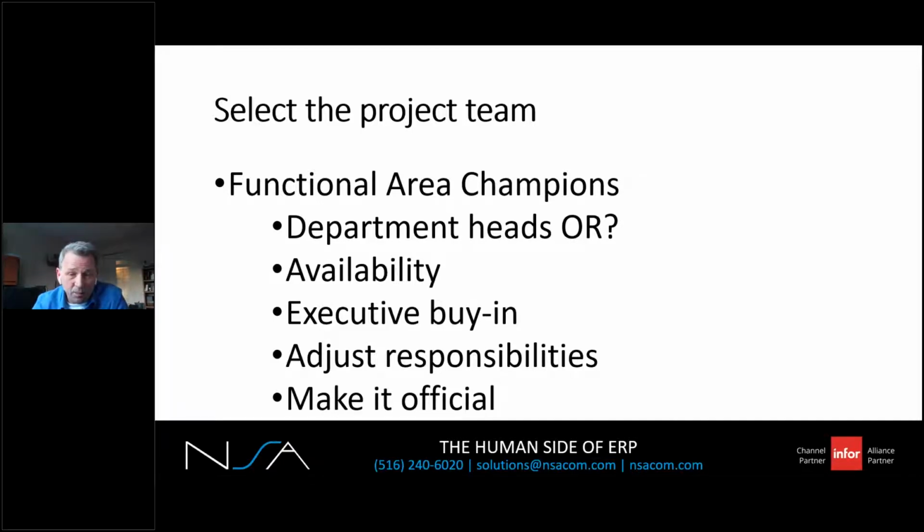It depends. An ambitious project with a short time frame will require more dedicated time, and a more spread out timeline with fewer deliverables will require less time. It also depends on the functional area. Your AR champion may not have a lot of changes from CSD, whereas your sales order processing champion may have a ton of changes in third-party integrations. So it depends on a few things.